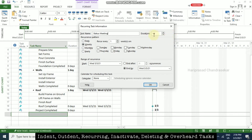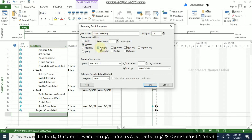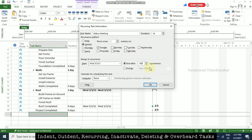Set the duration to one day and select weekly. Weekly Sundays could be our status meeting. You can select whatever you want and put the occurrences — for example, click 'End After' and put 100 occurrences. That will take us to around January 29th, 2023, so until then we will have a status meeting every Sunday.